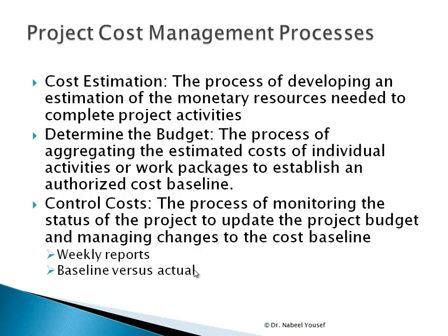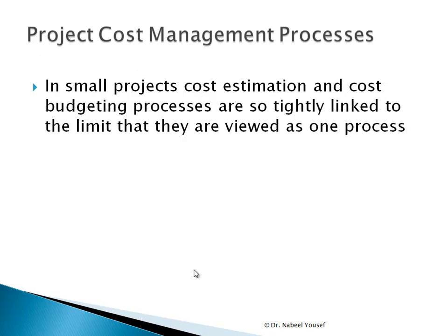Controlling the cost is the process of monitoring the status of the project to update the project budget and managing changes to the cost baseline, whether through weekly reports or by comparing the baseline versus the actual expenditure or cost of each activity. In small projects, cost estimation and cost budgeting processes are only slightly different, so you can merge them together and view them as one process.